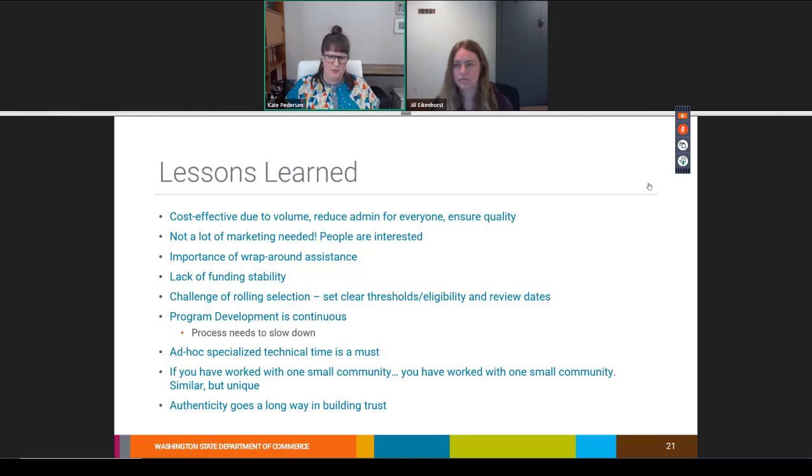Another huge thing we learned was that the feasibility studies are an immensely valuable resource to these communities. However, some projects could have benefited from a few hours of time with one of our technical experts early on to ensure that the project that was approved for the study was in fact viable and the best project for that community. I will never say that I'm a solar and storage technical expert. That's just not my role in this process. And because of that, I needed to bring someone else in.